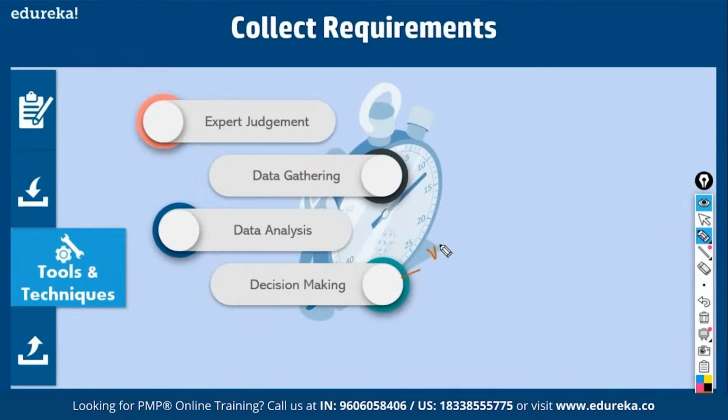Normally, decisions are taken by voting. Within voting, you have unanimity, that is 100% of stakeholders may upvote. Or at times you may not get unanimity, you may just get majority: more than 50% agree on a particular requirement. Or it could be plurality. In a plurality, it is not a majority. Let's say you have a group of 10, divided like 4, 3, and 3. So 4 is not a majority, but it's the largest winning block. These are the forms of decision making.